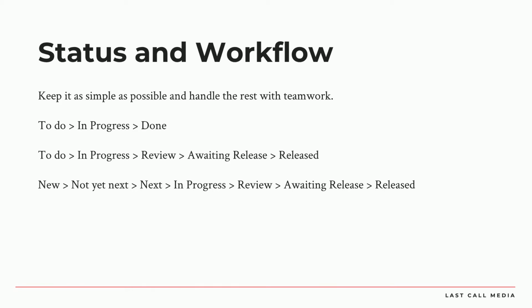When you have all of that, that's a lot of missed opportunities for conversations, right? You could imagine if you just had one review status and you're doing daily stand-ups every day, how is it that the team isn't going to know what's going on with that issue? So the more statuses you have, the more columns you have, the more queues an issue could potentially get caught up in, and the fewer conversations that you're having as a team. So the basic one that you're going to get when you start is just to do, in progress, done. That one's a little too simple, I think, for when teams are doing work.